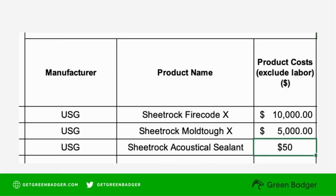The LEED cover sheet asks what products you're using, who manufactures those products, and what is the estimated cost of each product. The cost is the material cost only — fabrication and installation labor are excluded.